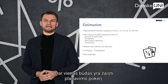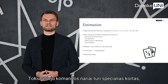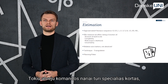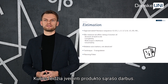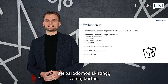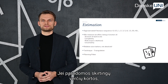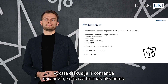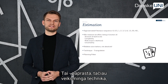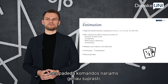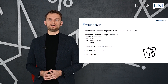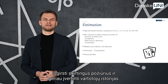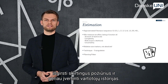One more way is to play planning poker. It's when team members have cards consisting of story points and estimate backlog items all together at the same time. In case some people show cards with different values, a discussion takes place and team members decide on a more precise estimate. This is a very simple yet powerful technique because it helps team members to align better, hear different perspectives, and understand the user story or task better.